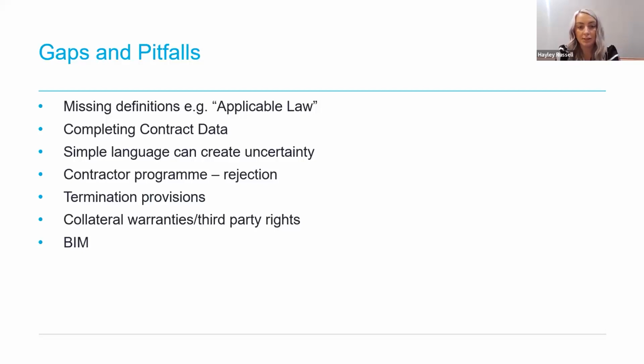Building information modelling often goes hand in hand with collaborative projects, yet building information modelling is not directly referred to or incorporated into NEC3. NEC guidance suggests that this is done by way of including a building information modelling protocol, such as the CIC protocol, either just by incorporating it into the works information, scope, or by using a Z clause.